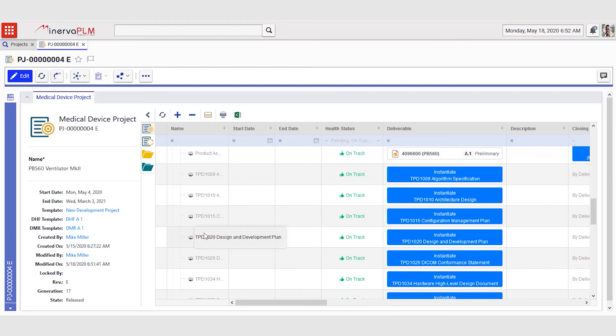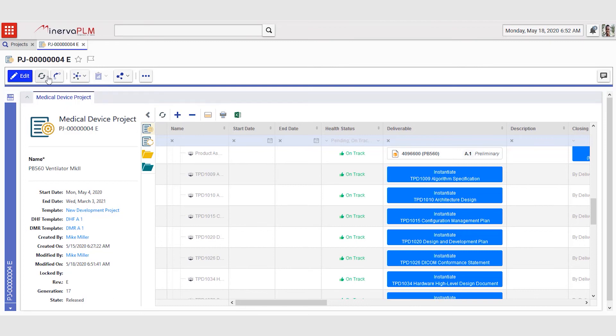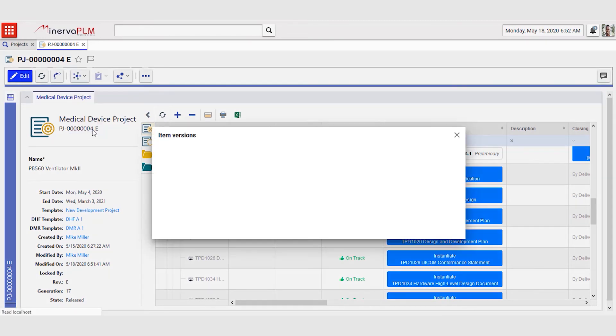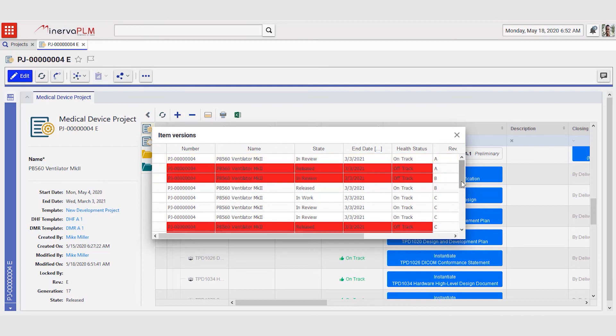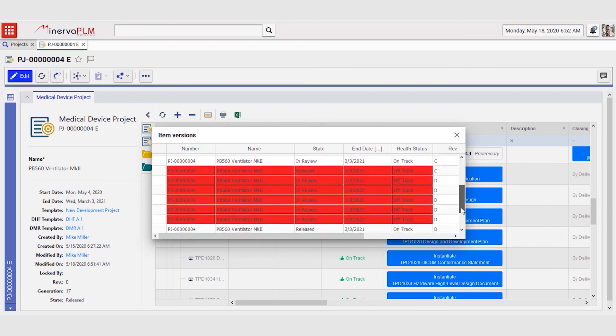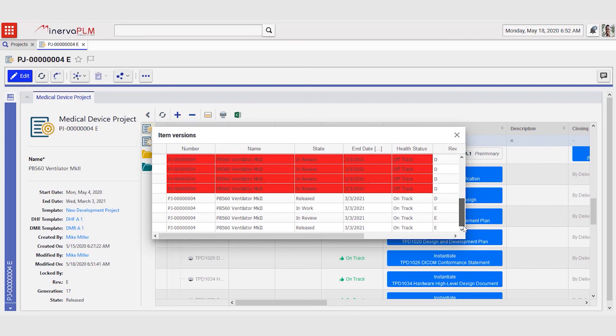For traceability reasons, old versions and baselines are always kept in the system. We can see now that this is revision E. What was the status of revision D of this project and how did the deliverable matrix and all the deliverables look at that point in time? Mike can go and open the version section of this project where all versions and baselines of the project are being kept.